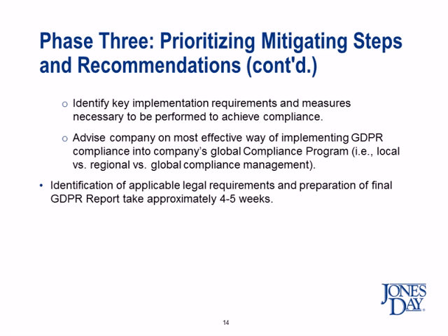So we see companies, clients opting for different ways, having a GDPR standing alone project versus folding that basically into a more global approach to compliance. In terms of timing, as my colleague outlined already earlier, we think that this phase 3 should probably be in the range of 4 to 5 weeks, again, depending on how the organization decides to run such a project. But we think that's a realistic time frame in order to think about prioritizing mitigating steps, having a proper risk assessment done, and then putting a report together that then is helpful for the next steps of the project. So with that, I hand over to my dear colleague in London, Jonathan, on implementation.